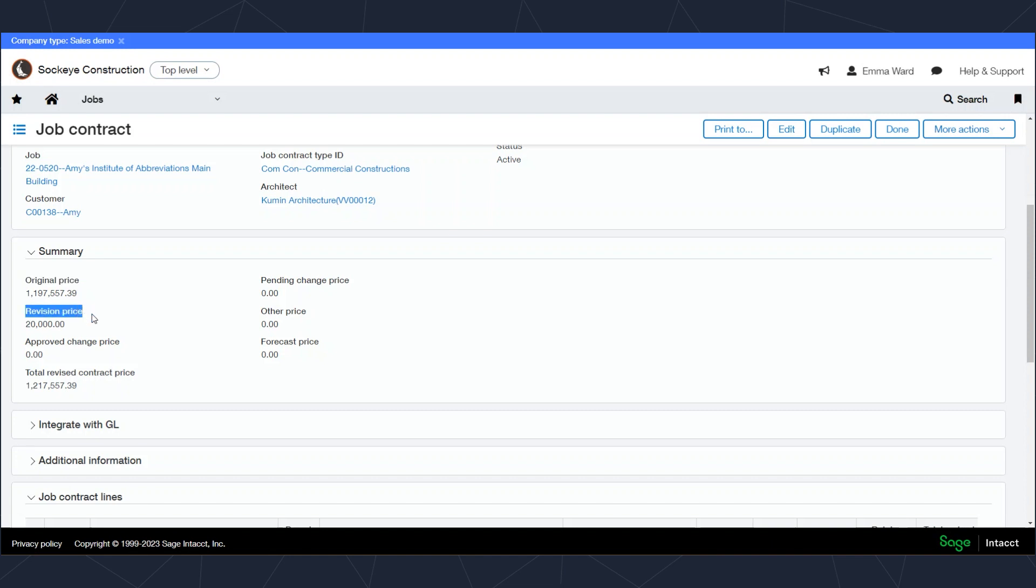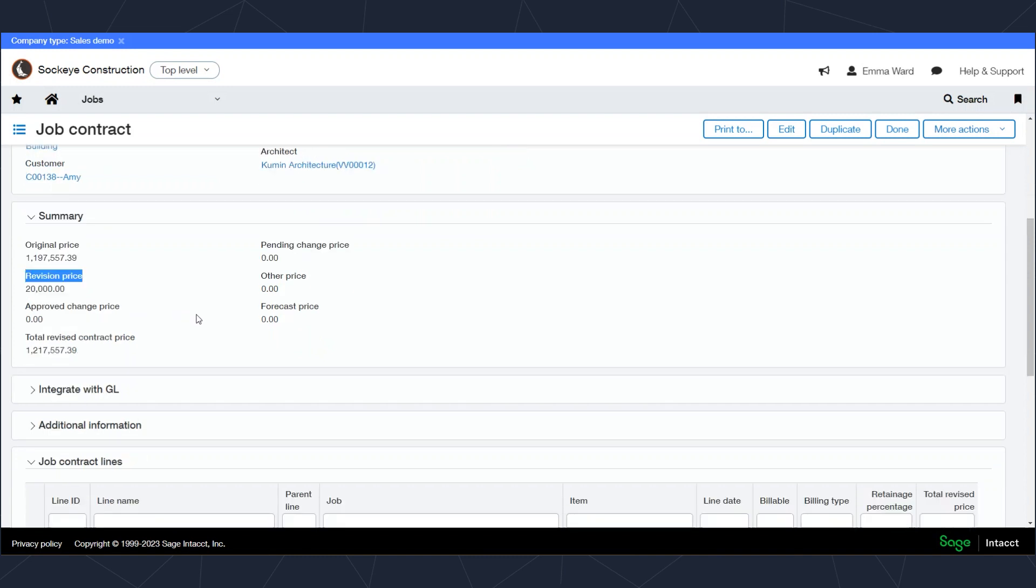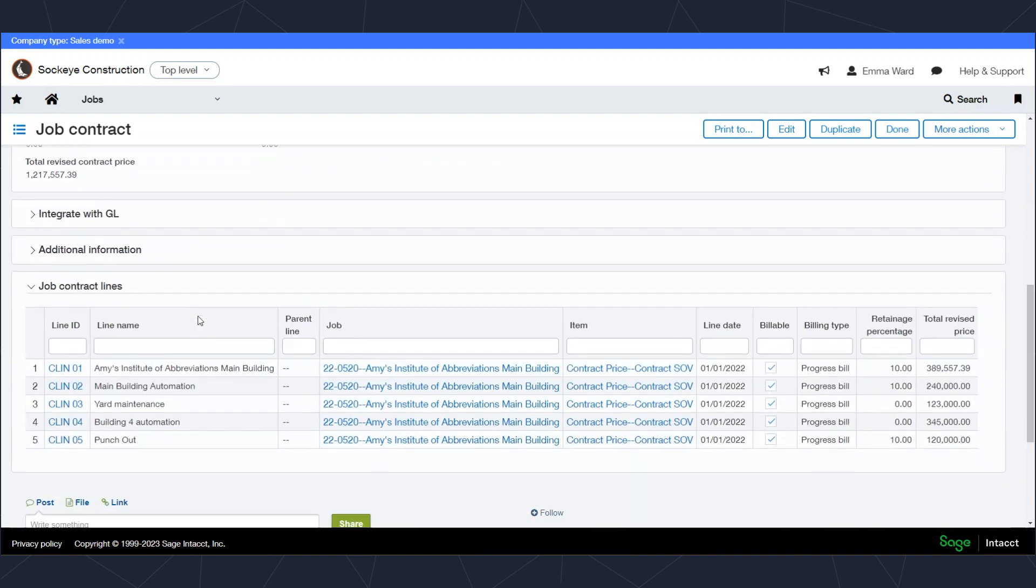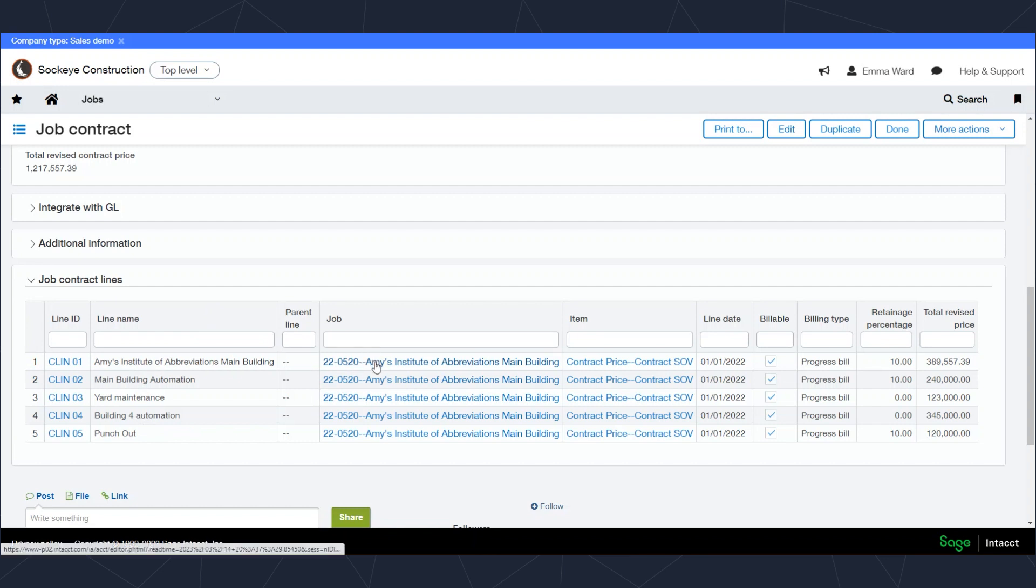On the bottom of the contract, you'll see the schedule of values. This schedule of values inside of Intacct can be as many different lines as you want, totally up to you, and the line descriptions can be whatever you want. Furthermore, an individual line can be its own project or its own job, or many lines can map to the same job. Again, totally up to you.